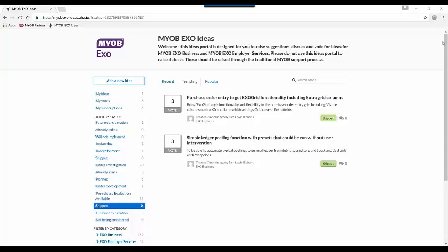Progress billing is really mostly for your quoted projects. Quoted projects tend to be broken into stages, and those stages are often what you would bill out. The progress invoice lines can be entered into the job either via the quote budget tab and then converted into an invoice, or entered directly into the billing schedules tab. That's two different tabs in job costing. As time and materials are used up on the job, in the timesheets and costs tabs, they can be assigned to the correct progress invoice.